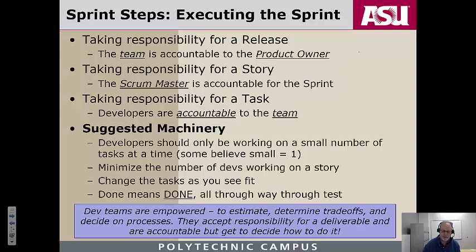It's a general practice in industry and Agile to try and keep the number of tasks developers are working on at any given time as small as possible, really one. Meaning when I look at the work that's laid out on our Scrum board, which we'll get to, my name should only appear on one thing that's in progress, and I should work on that till completion.